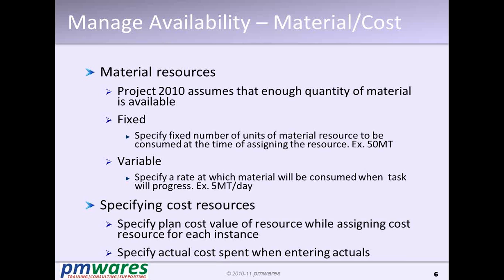That if I'm erecting a wall, then the wall in one day, I have 5 people working on this can consume 200 bricks in a day. So if the task goes for 10 days, it becomes 2,000 bricks, or like whatever, 200 bricks in a day.